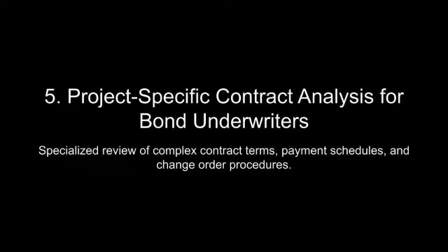Notification requirements within change order clauses are equally critical. These provisions outline the timing, format, and content of notices contractors must provide when requesting a change. Effective clauses ensure that changes are documented in real time, capturing essential details such as the nature of the modification, its cost implications, and the expected impact on the project timeline. From an underwriting perspective, these notifications provide a paper trail that can be invaluable in assessing claims.